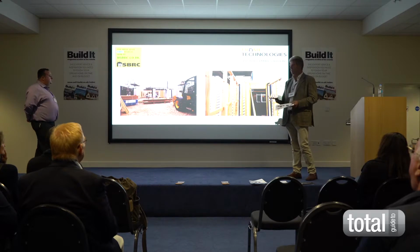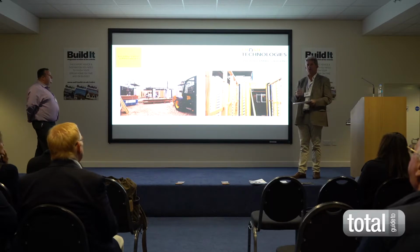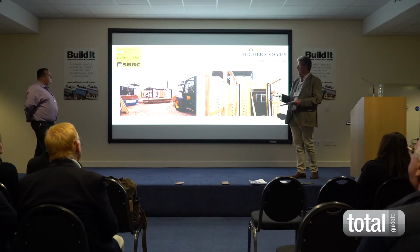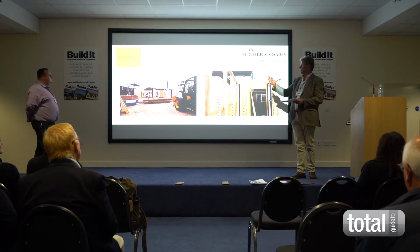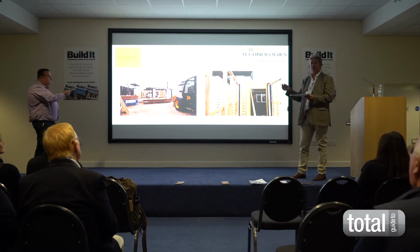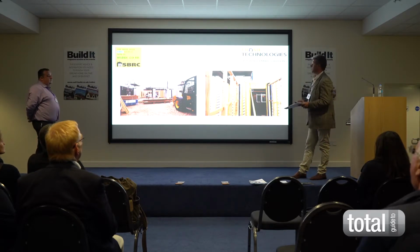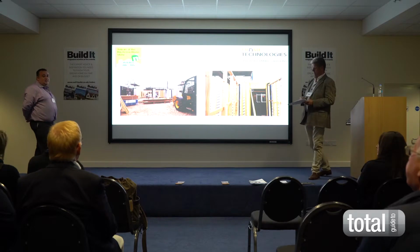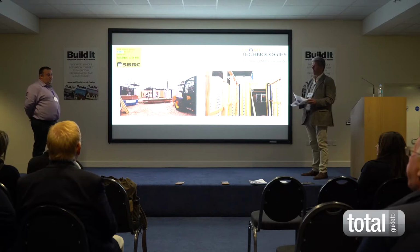And with the weather we're having, and like Martin was saying, with the rains and the winds, if you get winded off for a day, your cost has gone out the window with the craneage. But again, from a package point of view, we control that whole package. You'll get some companies who say, right, we'll supply the timber frame, we'll install the timber frame, but all the mechanical handling's down to yourself. Well, from a budget point of view, how do you control that? Whereas if we're supplying it, we're going to control it, and minimise that, or maximise that to its absolute. And if you've not done it before, and you phone a company up and say you want a crane or a digger or whatever, they'll charge you more because you don't know what you're talking about.